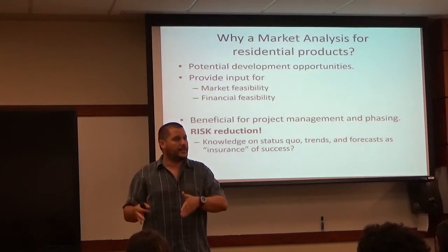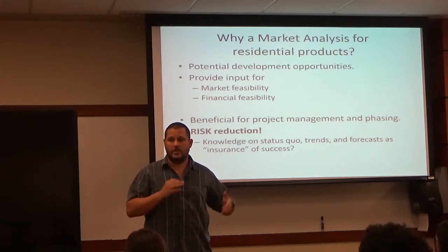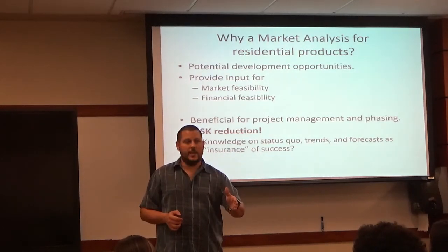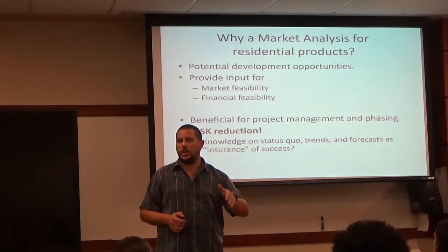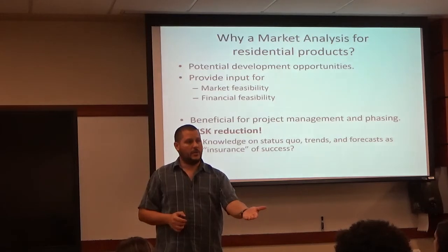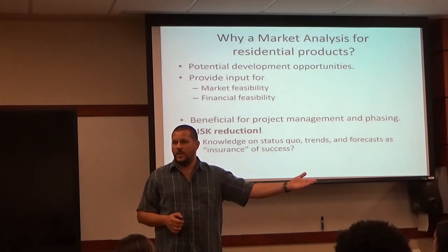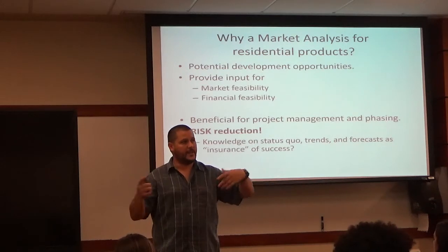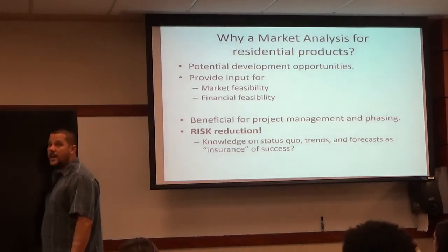I can say, over the next 5 years, I'm putting 100 units per year out. And if year number 2 works really, really bad, I might wait 1 more year to go back in, because the only cost I have at that time is the financing of empty land. So you've got to face that and take that into account.